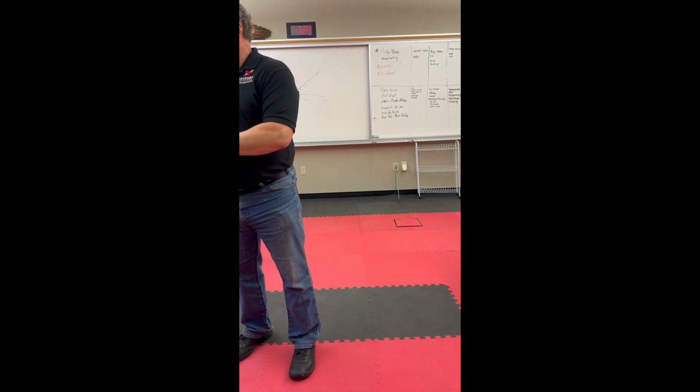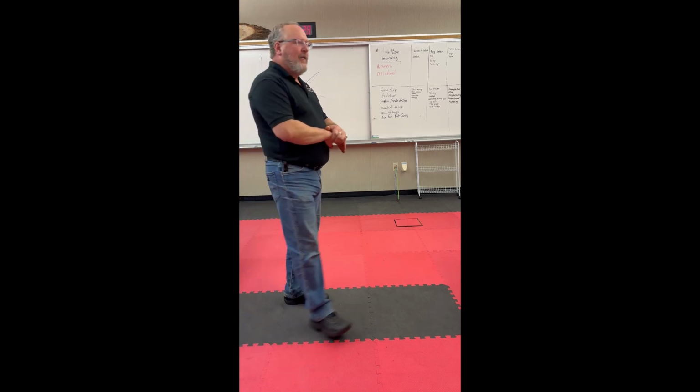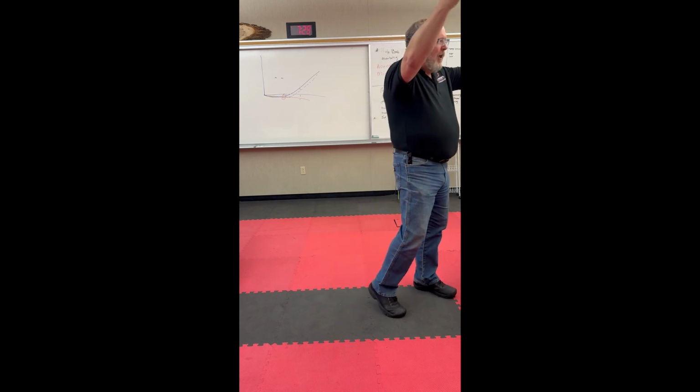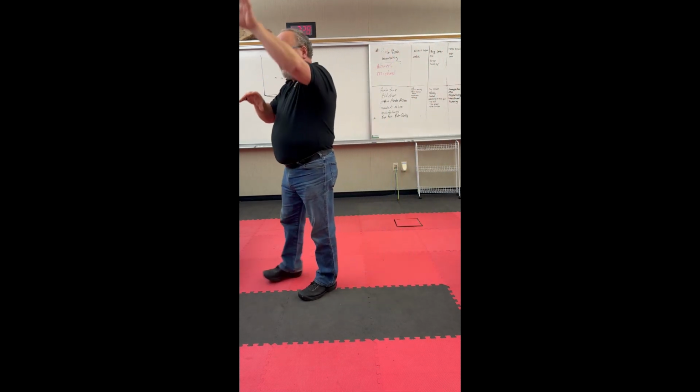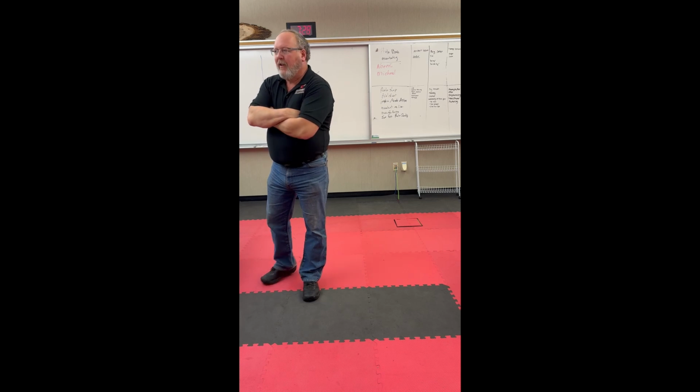Okay? What do we call that? Management reserve. So, oftentimes when I was managing the contract, and the engineers gave me a list of all the tasks that they needed to do, gave me all their milestones, all these tasks under each milestone, here's how many hours it's going to take, here's how much money I need, and then I steal 25% of the budget and tell them we didn't get $1 million, we got $750,000.